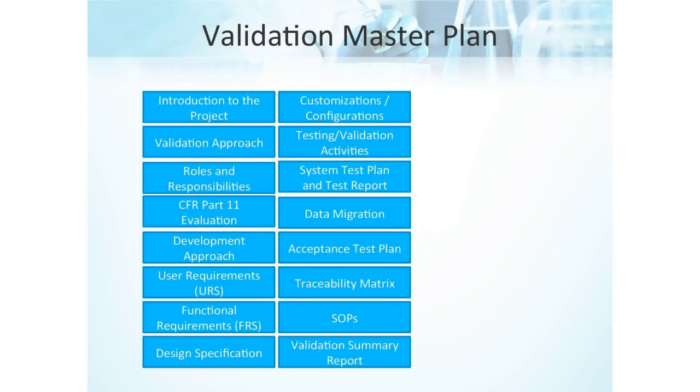Yeah. So, acceptance test plan. The acceptance testing needs to be written from the perspective of the end user, not the testers, not the developers, not the project manager. The question that needs to be answered in this section is, has the system and functionality been built correctly? Remember, we're trying to answer questions for validation.